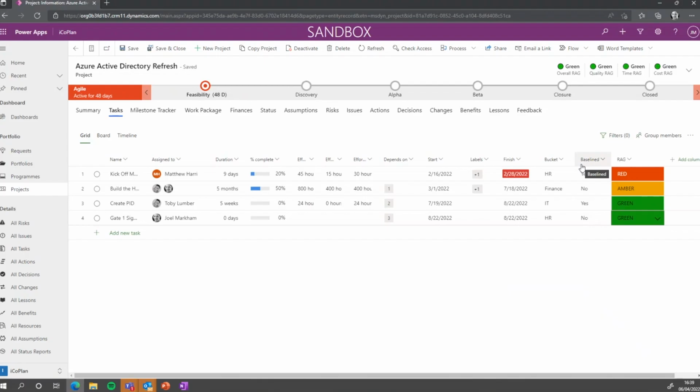Right. Yes, Haley. In this example, Project for the Web is that basic. You don't get the idea of baselining yet. But in IKEPlan, we have that feature, customized to everybody's requirements. We have the ability to say, baseline the project plan at PID, for example, or discovery, and then once the discovery baseline is taken, the RAGs are applied at that point, but they're not really applied here in the project plan. They're applied at the top level, like time, for example, or cost.